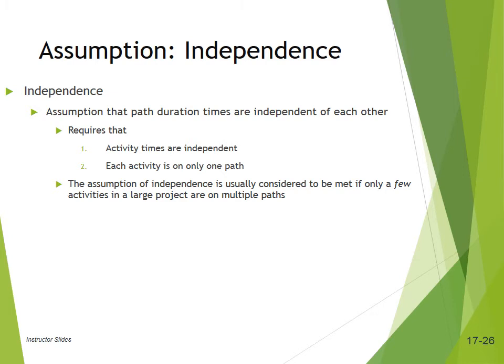There are certain assumptions in this network which you are drawing. The activity times are independent. Each activity is on only one path. That means this is what we don't do.